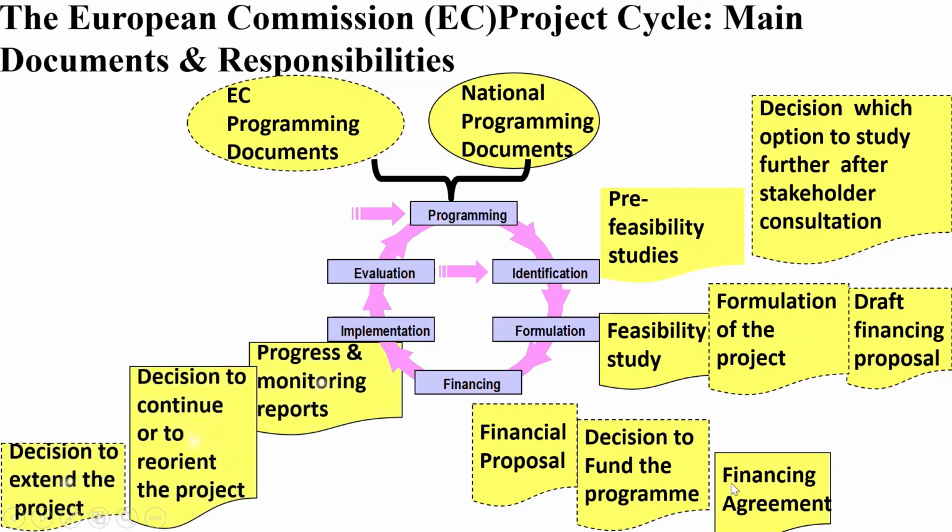And then implementation: progress and monitoring reports, decision to continue or to reorient the project, decision to extend the project. You see, when implementation comes, remember, we planned probably even last year, if it may be so. By implementation, a lot of water could have passed under the bridge. Conditions may have changed. Things, offices may have changed. So progress and monitoring reports will reveal that, and there will be a decision to continue or to reorient the project.